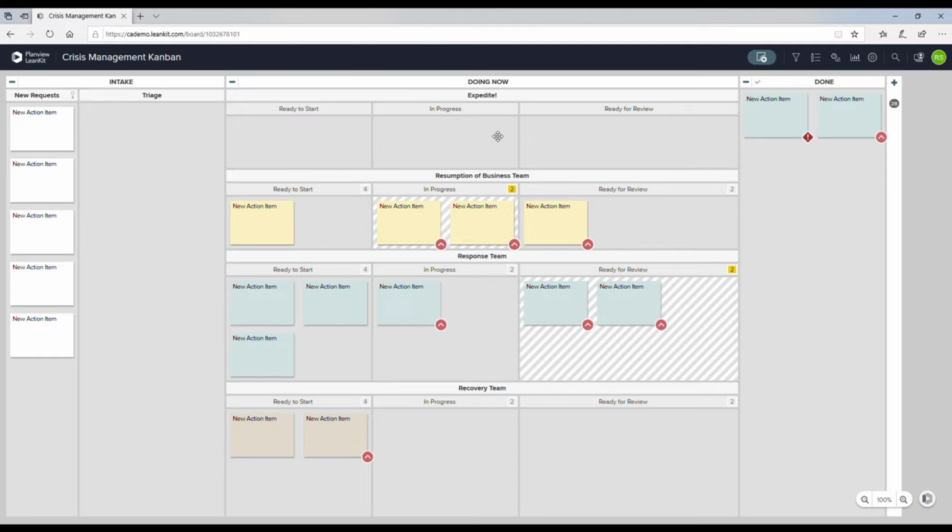Now, as you can imagine, you don't want to abuse this. You want to make sure there are classifications around what is an urgent or expedite work. What goes into that classification? What are the criteria that it needs to meet in order to hit that, and make sure it's something where it can't be abused. Where lesser high priority or important stuff that somebody just wants done doesn't get pushed up there. Right? There should be few expedites that happen on a regular basis for any team. But we do want to create that pathway there to respond to them when they do come up.